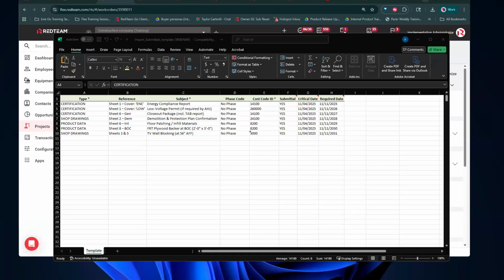And then you can actually use that request for approval PDF as a submittals package. I've seen a lot of larger clients download all of the submitted and reviewed files, along with the cover page we generate. You can actually upload that into, like I said, Newforma or other softwares that your architect may require or your ownership may require. It can still be nice to track for your team through Flex so that you know officially what the answers are. You keep it all in one place. Your team isn't having to go to that third-party software that the architect or the owner is using.